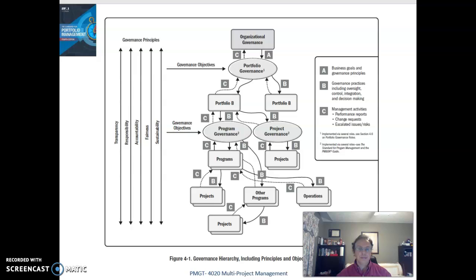Chapter 5, Capacity and Capability Management. The objective is to determine the optimal balance of resources used and needed. Capacity management is one of the most complex and critical areas in portfolio management. It seeks to address resource demand conflicts between components. It's done through capacity planning, which measures component demand against supply. Basically, what resources are needed, how many, and when, across 4 different categories: people, the human resources; financial capital, money; assets, which would be equipment, buildings, and intellectual capital.